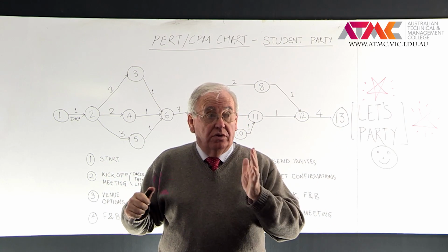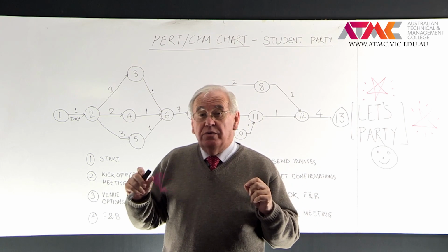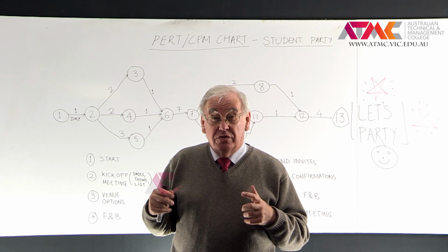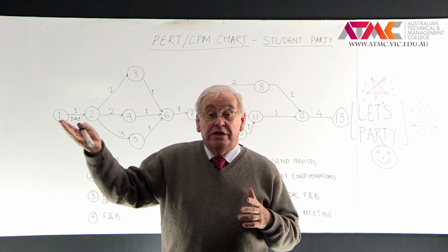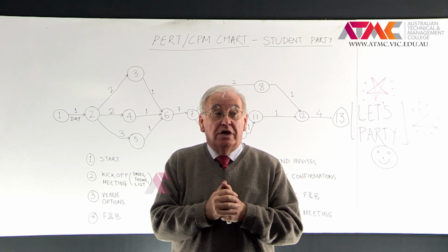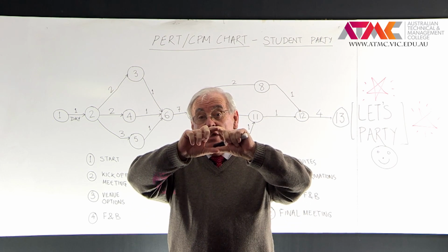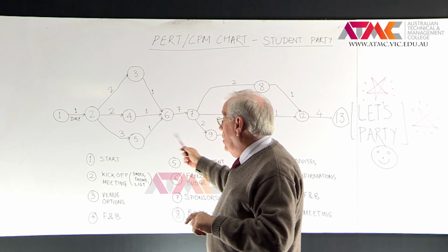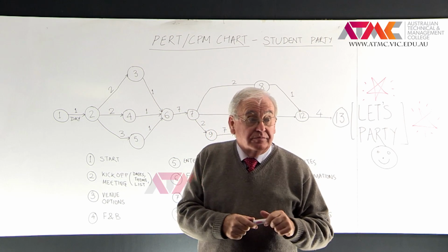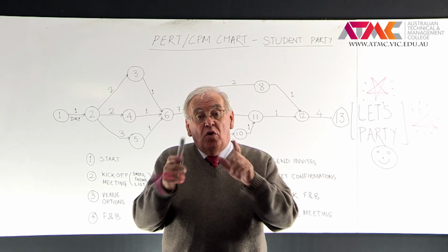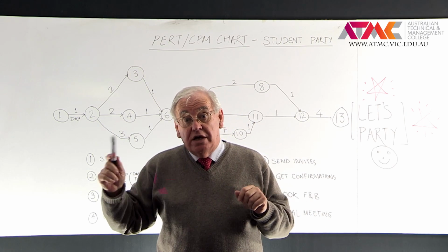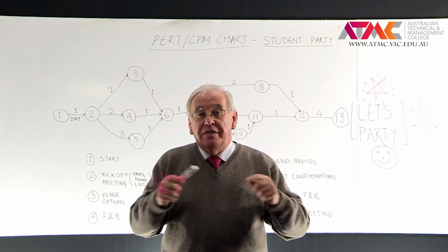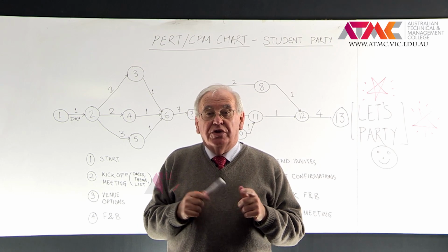It schedules it all. It puts it into sequence, and some of the activities that you do in a project, or the tasks or the events, can be related to each other. And they put the duration in the form of a network, as you can see behind me, this network. And all the lines that join each task together is called a path. And the longest line, the main line, is called the critical path.